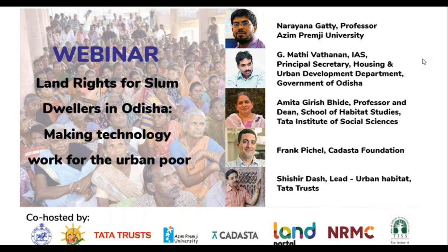So we had to supplement the capacity and resources from the state level. We managed from the urban local body and reinforced the workforce, and then somehow got the work done. Otherwise, that could have been impossible. The lack of capacity of the NGO partners in several towns was one of the vexing issues we had.